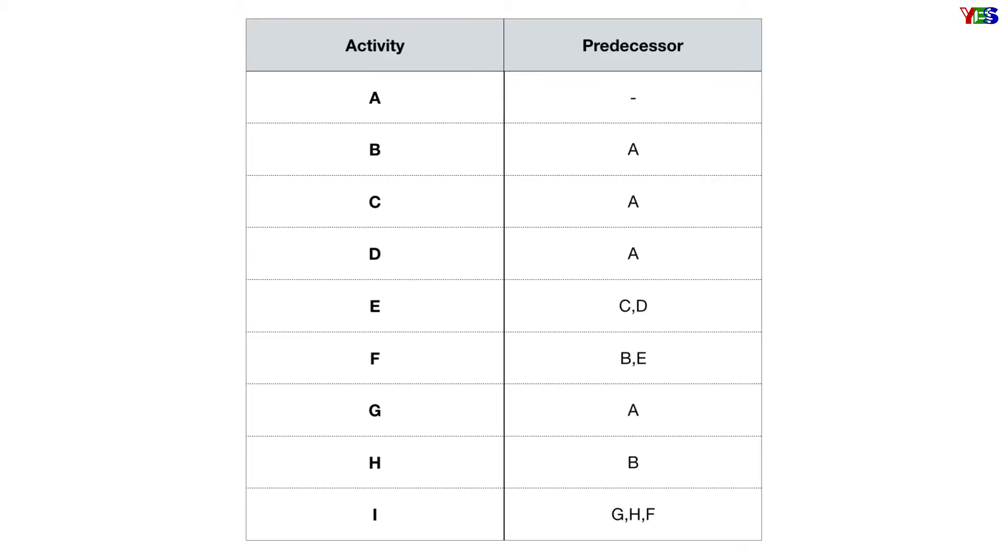Let's have this example to get better into it. Here we have A as initial activity since there is no predecessor, and B, C, and D are successors of A, or we can say A is predecessor of B, C, and D. So let's draw it in a network diagram.